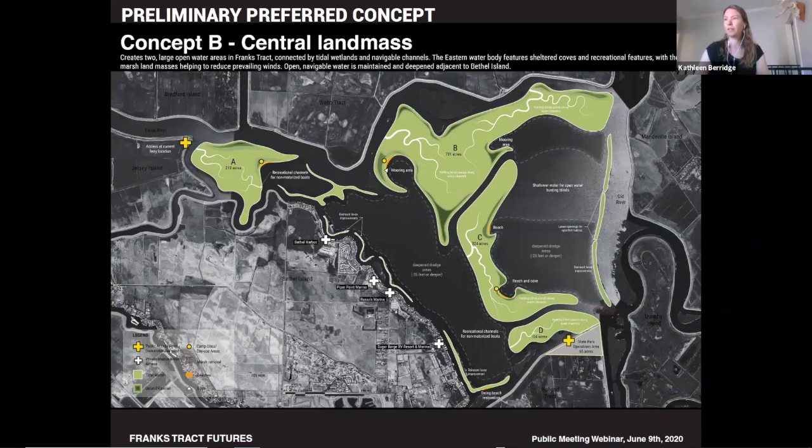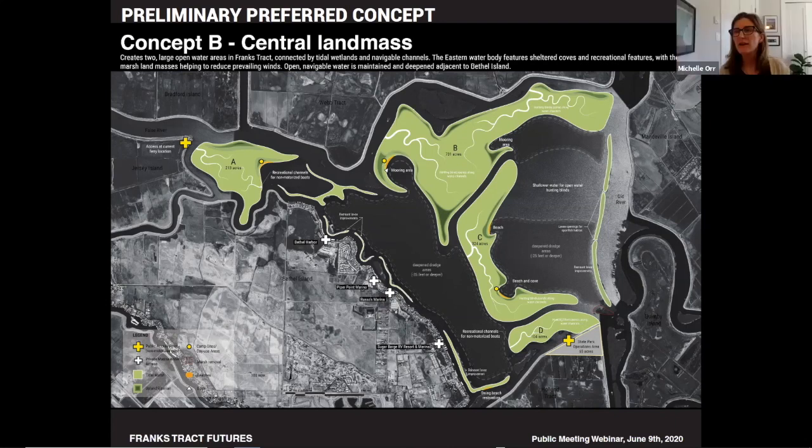All right, moving on to another question by Denise Eisenbase. Will construction be continuous year-round, or will there be pauses in construction based on wildlife timing, spawning windows, breeding times? Yeah, so those construction windows based around species needs will have to be part of the permitting process, and negotiating those pauses in construction and seasonality of construction with the agencies will definitely affect the construction schedule.